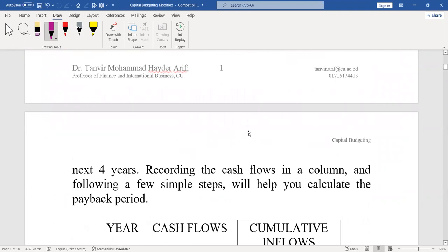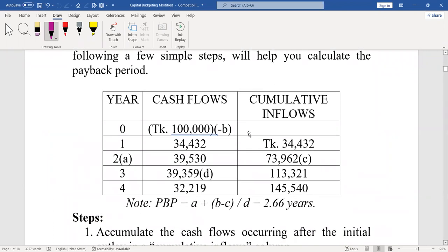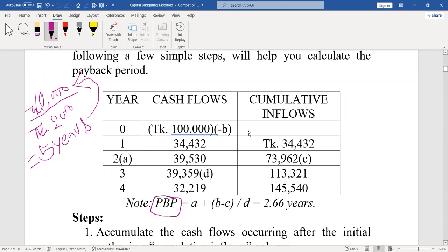Now we will check how to calculate payback period. If cash inflows are equal, then it is very simple. For example, if you invest Taka 10,000 and every year you get Taka 2,000, then simply it will take five years to get your money back. But when we have unequal cash flows, we can use a formula to calculate payback period, and you are familiar with this formula.